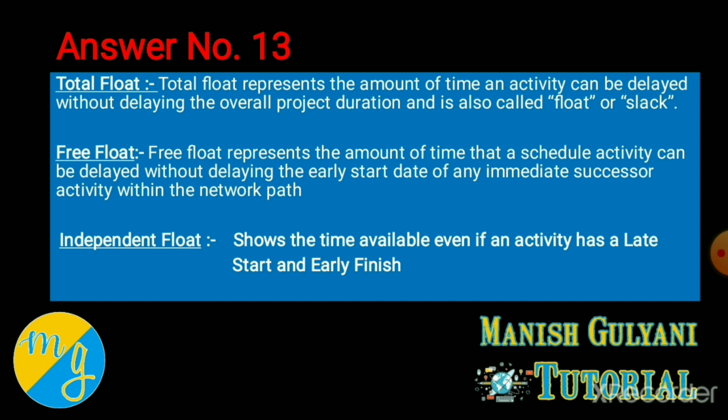Now what is free float? Free float totally depends upon the value of total float. Free float is the difference between total float and head slack. Free float is also known as normal float. Keep in mind this thing.